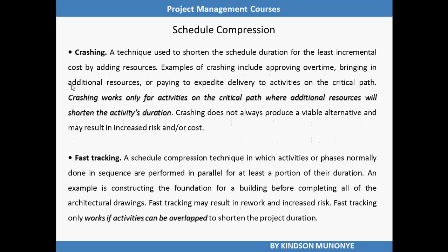Schedule compression. There are two types of schedule compression. Remember that schedule compression has to do with reducing the time spent on the scheduled activities or the total time it takes to perform activities in the schedule. One of the schedule compression techniques used is called crashing. Crashing is a technique used to shorten the schedule duration for the least incremental cost by adding resources.